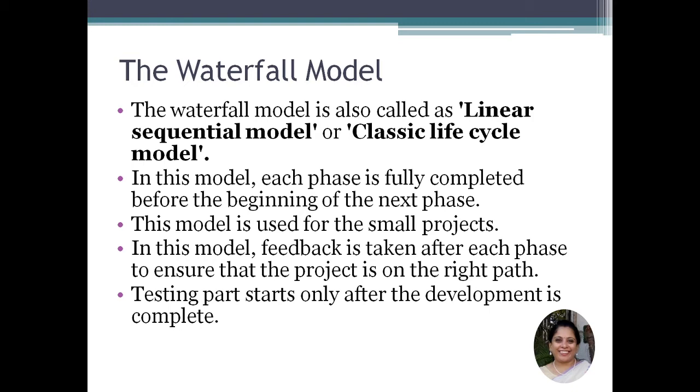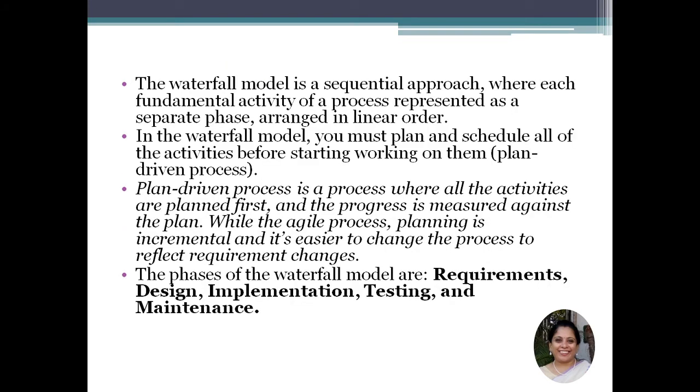So the waterfall model is a sequential approach where each fundamental activity or process is represented as a separate phase and is arranged in a sequential or linear order. Now in the waterfall model, we must first plan and schedule all the activities before starting work. So here the entire project or the model has to be ready in hand before we start with actual execution or starting with the code of the model. So it is a plan driven process because the plan is ready.